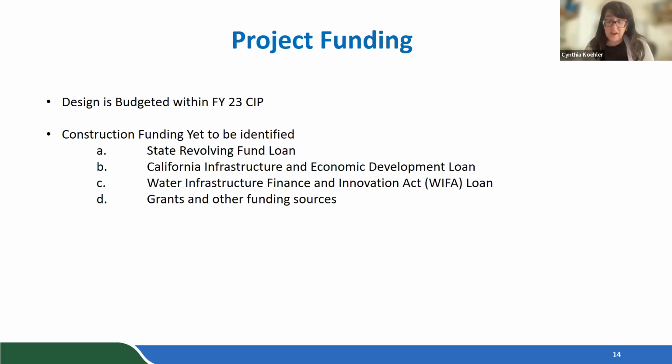But we're not there yet, Larry. Can't we let the process go forward? I'm concerned about derailing this based on an estimate. Sure, but what I'm saying is I'm going to be jumping up and down if this thing comes in at 35 million. Okay. Also, as this slide shows, if we actually have a design in hand, in a shovel-ready project, we would have the opportunity to apply for grant funding. So getting to the final design is the next step.